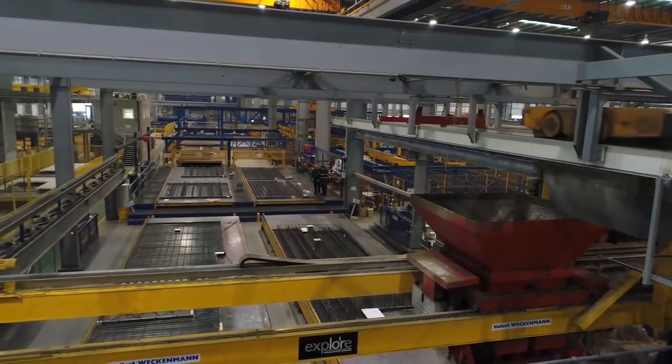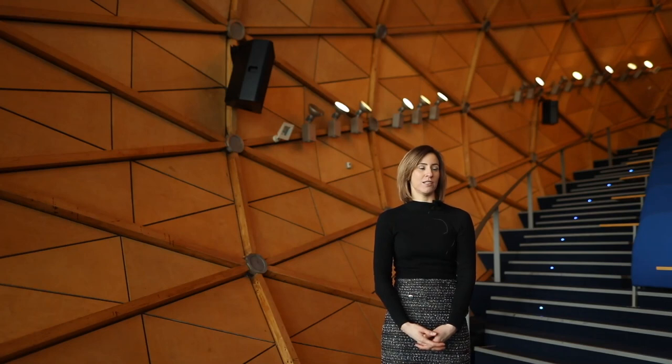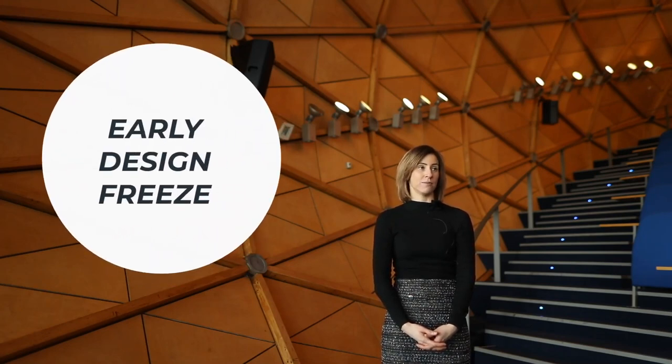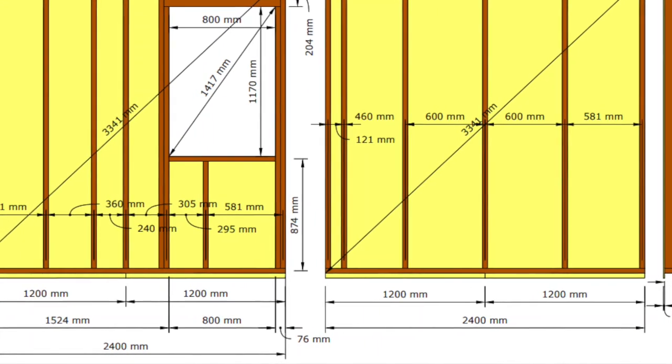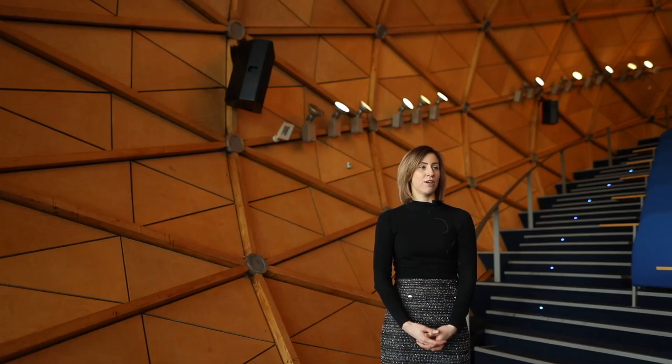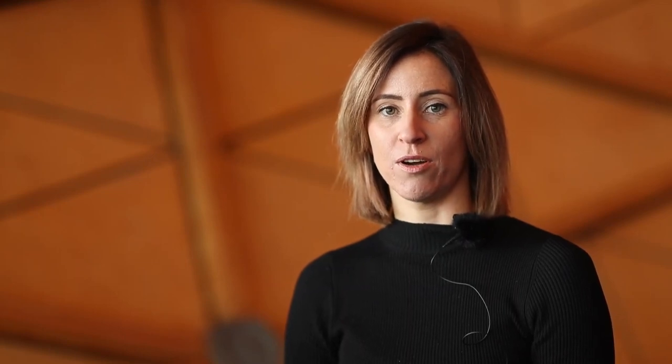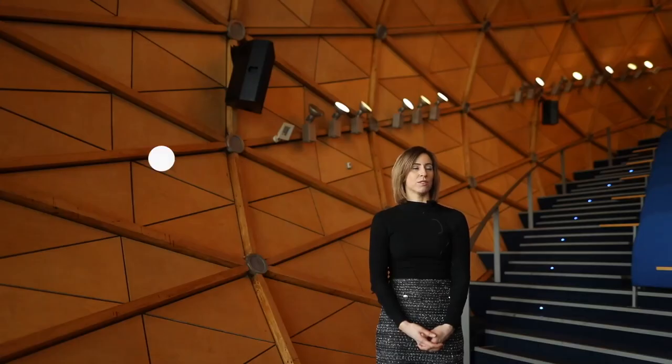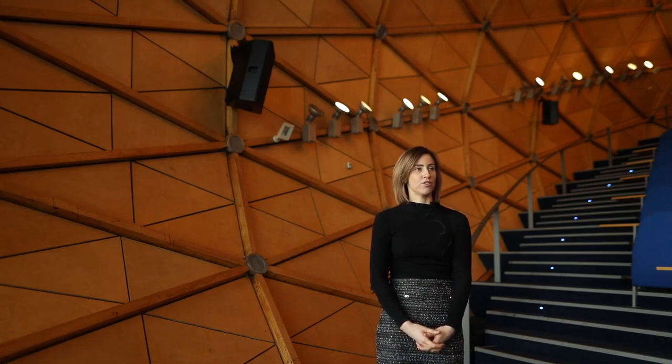With offsite construction and the factory environment there are many opportunities to use semi-automated equipment, and production instructions can be generated from the design model — bridging the gap between design and manufacturing. The RIBA Plan of Work with its eight stages is used throughout the industry in both offsite and traditional construction processes. The main difference when designing digitally for offsite construction is the so-called early design freeze — the stage before manufacturing starts when all aspects of the design need to be agreed and finalised. This can be very detailed, right down to the style of kitchen cupboard handles. This is a very important change in mindset for designers compared to traditional process where changes sometimes occur while the building is in construction. One of the main benefits of this early detailed design stage combined with BIM is the so-called digital twin — data-rich component-based models of entire projects helping to show the stages of construction through detailed analysis of the building's performance before any works begin on site.